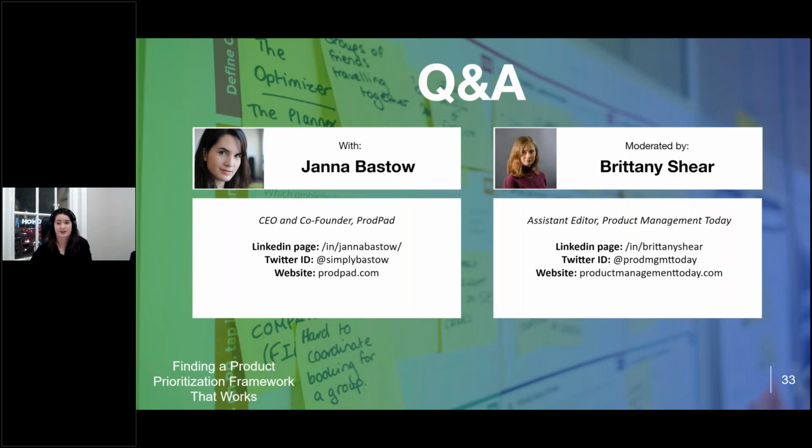Your job then is actually a lot easier. You just figure out more or less what are the next few things to go in. If they've cleared out 20 things in their last sprint, go put 20 more things in there, but flag up the things from the last one saying these are still pretty important, so make sure to try to prioritize those for the next sprint. And that should give you the best of both worlds for both the product managers and the developers.